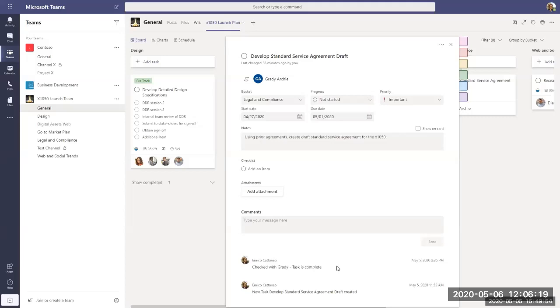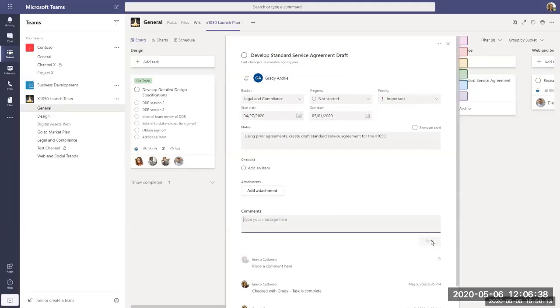He just didn't update the task, which brings up a really good best practice item to apply when you're managing these tasks. Anytime someone interacts with the task and makes an update, have them place a comment here. This gives you the capability to track what's going on within your task. So if Grady completed it and just forgot to mark it as such, now I as the PM can come in and say, well, actually, it was completed. It's already marked as complete now. Based on that, you can see it actually has the cross-through up top here to indicate that as well.